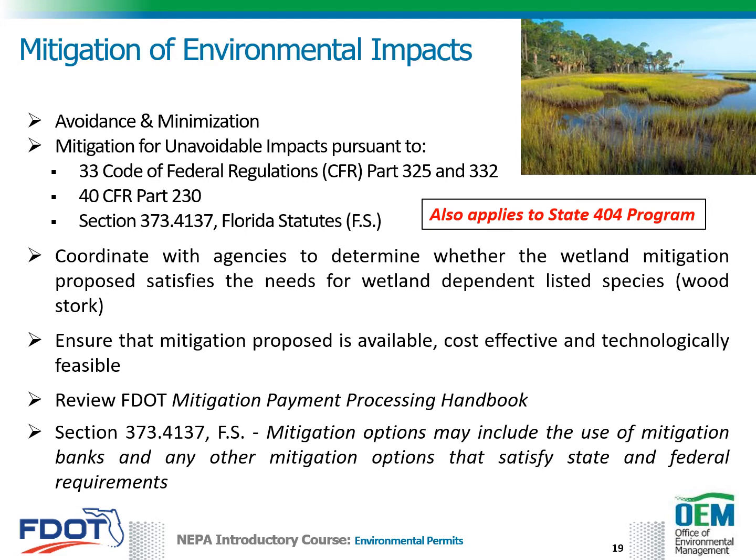Review the FDOT Mitigation Payment Processing Handbook for more information on mitigation options, including purchasing mitigation credits or funding water management district services. Section 373.4137 of the Florida Statutes states that mitigation options may include the use of mitigation banks and any other mitigation options that satisfy state and federal requirements. For example, mitigation bank credit purchases, funding to water management districts for mitigation services, and FDOT responsible mitigation projects.